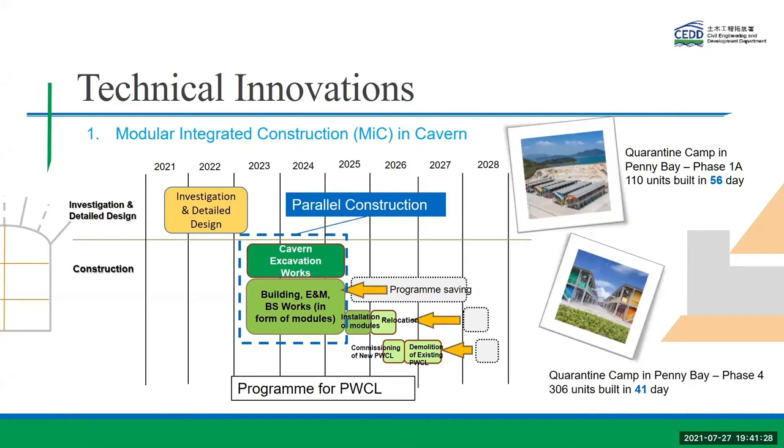Several weeks ago, I attended a seminar and learned that HSD has successfully constructed a hospital within several months. The key to the success is the adoption of MIC, Modular Integrated Construction. In order to meet the tight program, adoption of MIC could be a possible life hack. The beauty of using MIC is that we will be able to do parallel construction. That is, when we are doing the caverns formation, the structural elements could be fabricated in the factory off-site. Upon the completion of the caverns, we could deliver the modules to site for assembly.